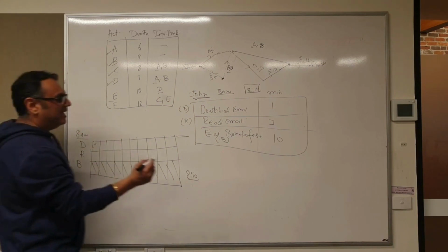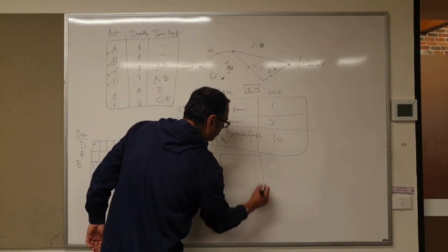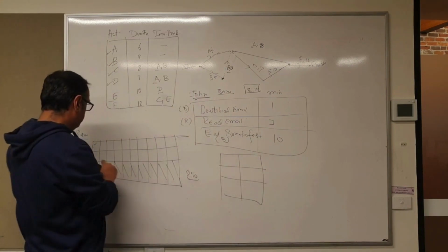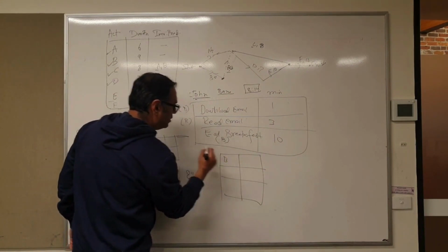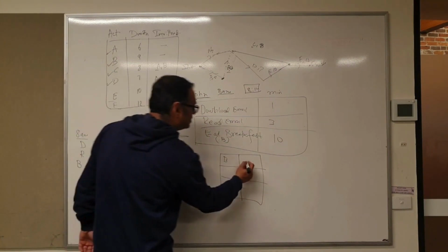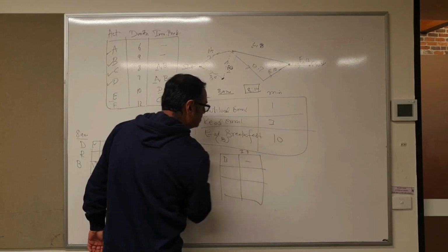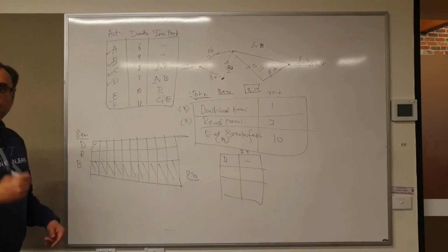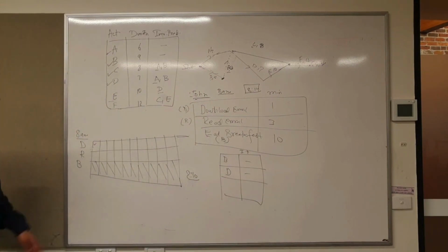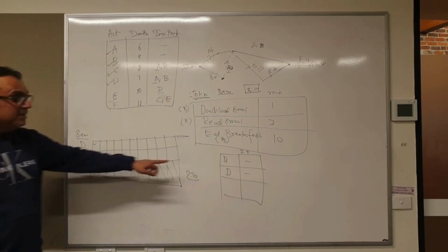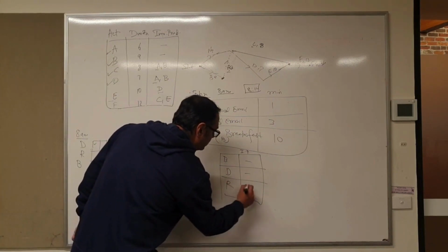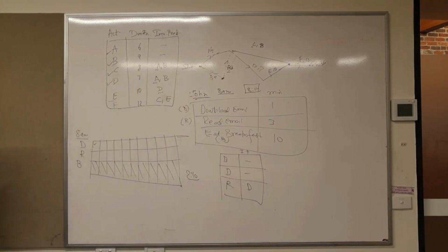So your activity diagram could be breakfast. It doesn't need anything else to start. So no immediate predecessors. This is immediate predecessors. Downloading email doesn't need anything. But reading email needs email to be downloaded. So reading email needs a downloaded email.